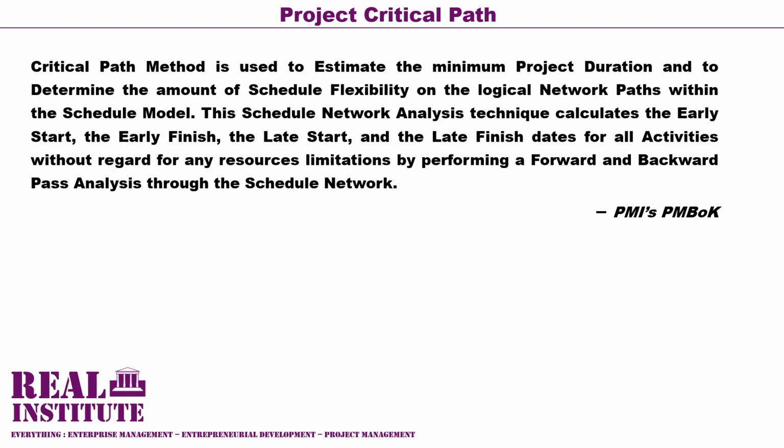According to the PMI's PMBOK, the critical path method is used to estimate the minimum project duration and to determine the amount of schedule flexibility on the logical network paths within the schedule model. This schedule network analysis technique calculates the early start, the early finish, the late start, and the late finish dates for all activities without regard for any resource limitations by performing a forward and backward pass analysis through the schedule network.